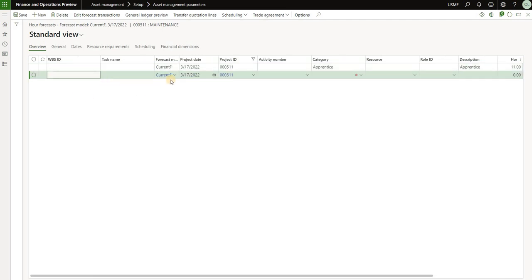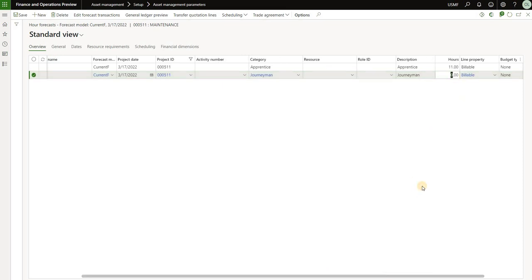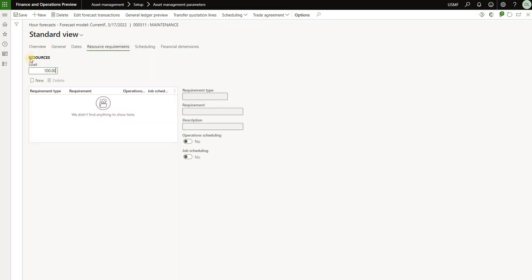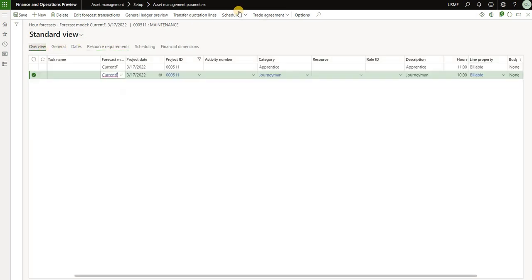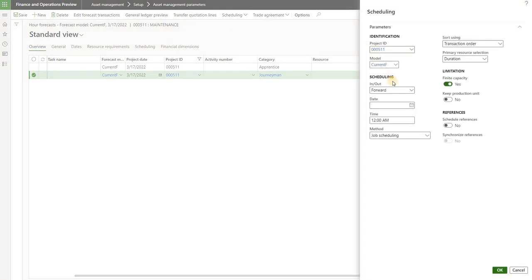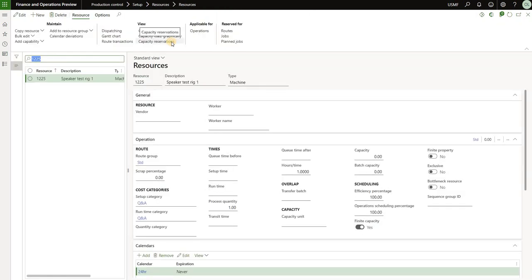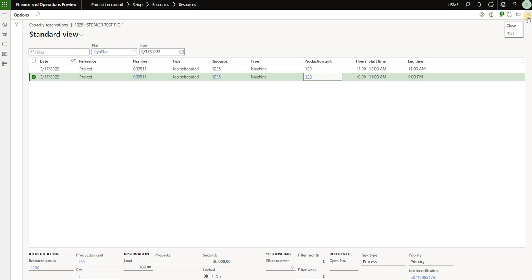I'll create another forecast record for the same date using a different project category — journeyman — and specify 10 hours. Next I need to specify resource requirements: I'll select the first line, click on resource requirements, click new, and assign resource 1225. I'll do the same for the second forecast line. With that in place I click on scheduling and do resource scheduling — forward from an empty date, meaning as soon as possible from today. Clicking OK and coming back to resource 1225, I click on capacity reservations and see two lines: one for 11 hours and one for 10 hours.